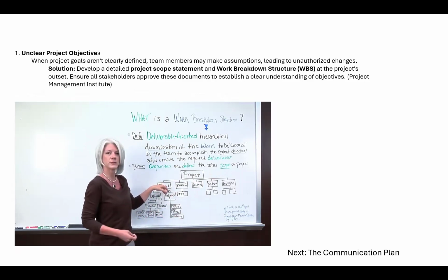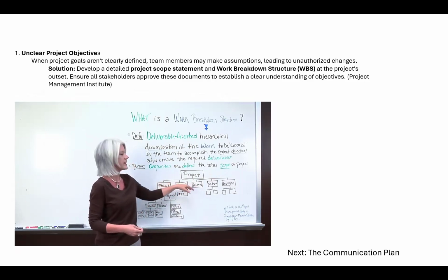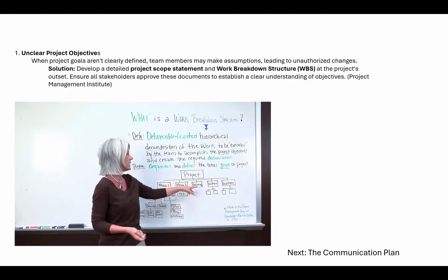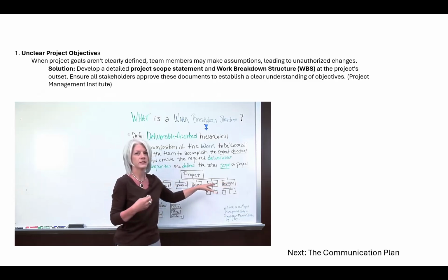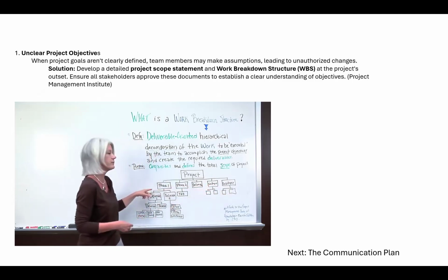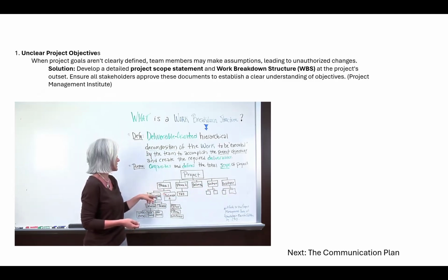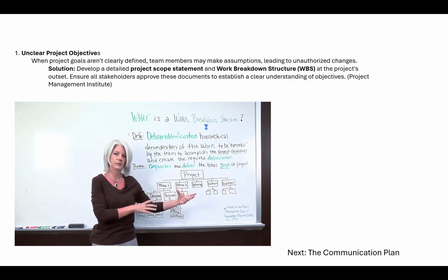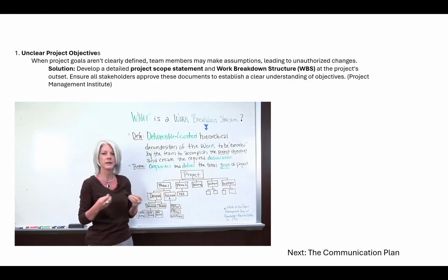So there may be a phase 1, phase 2, or other multiple phases. This one has 2 phases and a main high-level deliverable produced. This also can include sub-projects that are broken down as well. But if you look at phase 1 and break it down, it has 2 deliverables beneath the phase. So it's producing 2 main deliverables. And so we look at what's the work required to produce these deliverables. So we keep breaking it down.